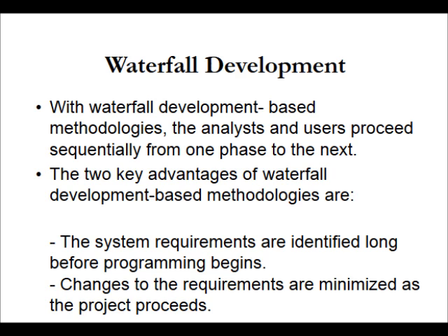Waterfall development. With waterfall development based methodologies, the analyst and users proceed sequentially from one phase to the next. The two key advantages of waterfall development based methodologies are the system requirements are identified long before programming begins, and changes to the requirement are minimized as the project proceeds. So this is important for waterfall development.